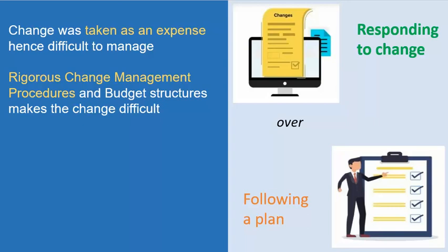There are rigorous change management procedures in place. If you want a change during the development, you have to provide a sign off, do a change request, make changes in the contracts, then bring in the changes in the business requirement document and the design documents, and then give me a sign off again on all of this. So it goes in a cycle. And of course, it comes with an expense. You're talking about a change request, and some more money for the customer.